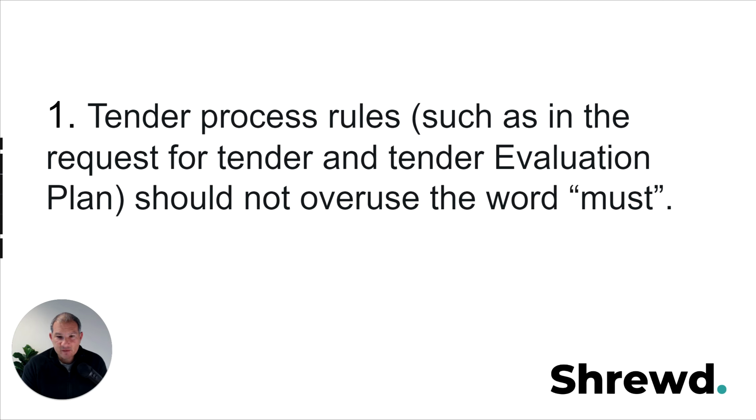You may want to leave yourself some discretion. So you should look at every time you use the word must in your tender documents, and that includes in any statement of requirement or statement of work. Look at how often you use the word must, because when it comes to evaluating a statement of requirement or a statement of work, if a tenderer or vendor doesn't comply with a must, then they have to be excluded. That's the general rule. And in your tender process documents, like your evaluation plan, if you say that you must do something, then guess what? You must do it, when in fact maybe you want to allow yourself some discretion.